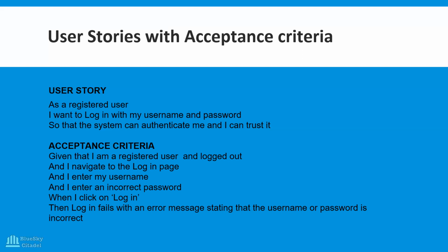As a tester, if you go in and put in a correct username and an incorrect password, click on login, and an error message comes up, you say, correct, that's good. So you've passed, the test has been passed. But if it logs the person in, that is when you say it has failed testing. And guess what will happen? The tester will raise a bug. You will get the hang of it as the training goes on.